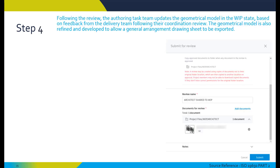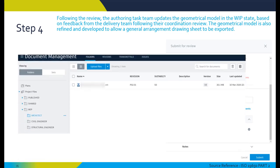At step four, the Revit model is shared via the common data environment or BIM 360, and this is managed by the lead appointed party. In this case, the delivery team reviews the model alongside other information containers to facilitate the continuous coordination of the information across each element of the information model.